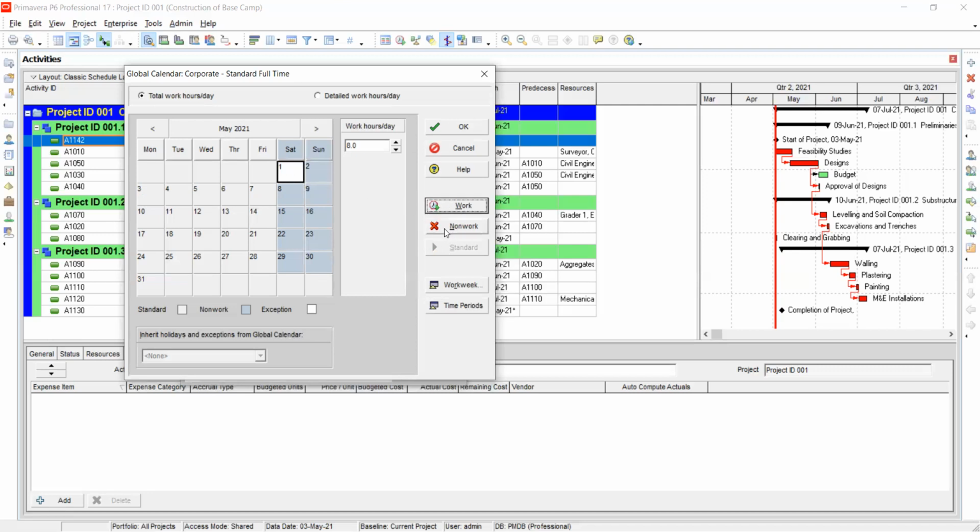So it's simple now. What we were talking about before is just done from here. But the problem with the one you're talking about is a bit different, because this is modifying the global calendar. Unless you've identified that date, I will only have that activity. Because you may have some other activities, and when you make it a working day, and the other ones have maybe 3 days, and the second day was on Friday, it may also assume that on Saturday you can work on it.